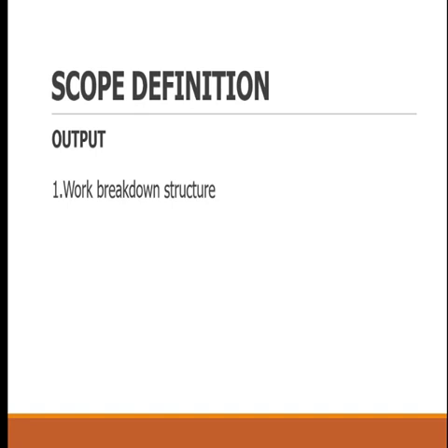This project has 4 phases. The first phase is the requirements. Second phase is to know the design. The third phase is to have what we call the construction. The last phase is to do testing. So once you know requirements, know the design, construct it, then you test it.